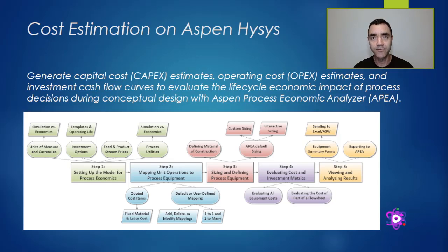The value that I have shared with you in the spreadsheet is a quotation of a real equipment that is around $550,000 US dollars. So there is a big difference between the results from the process simulation and the results of real life. But in that case, the compressor is a reciprocating compressor. So when you change the technologies of the equipment, the price of the equipment will also change.